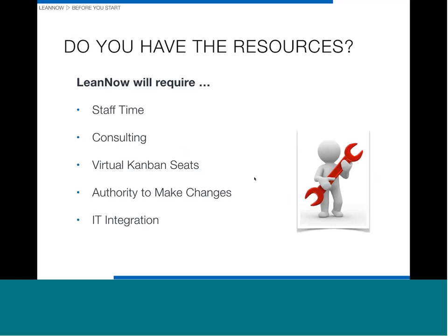So do you have the staff time set aside so that you can actually spend the time learning and applying lean principles? Do you have consulting support if you need it to help implement lean? In the case of the approach we take, we use a virtual Kanban board, so that requires that an organization obtain virtual Kanban seats for everybody in their organization that will be part of the lean flow. And also, do you have the authority to make changes? And for those of you who want to integrate the virtual Kanban boards with other IT applications, do you have the ability to do that integration during the short time that the LeanNow implementation would happen? So I want you to make sure that you have a commitment for these resources before scheduling the kickoff.